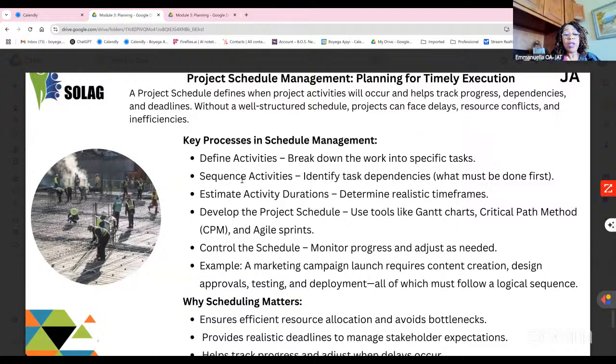So it could be getting the hall. Under getting the hall, your breakdown could be securing a venue, paying for it. Then you have decorators decorating the hall. Then what else is going to go into that event hall, which is one deliverable? Those are some of the things you have to factor in, but it's important again to know what the interrelated activities are, so that you can sequence them. Because if you fail to sequence your activities, you may end up not able to get to the next one because you haven't done A first. So go ahead, Dr. Charles.